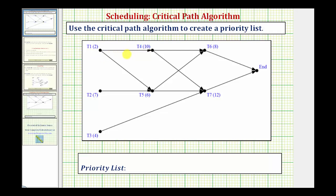So if we can find a path that takes longer, this would not be the critical path. Starting at task one again, if we went from task one to task five, to task seven to the end, that would be two plus six plus 12 — also 20 hours. If we went from task one to task four, to task seven to the end, that would be two plus ten plus 12, or 24 hours — that would take longer.